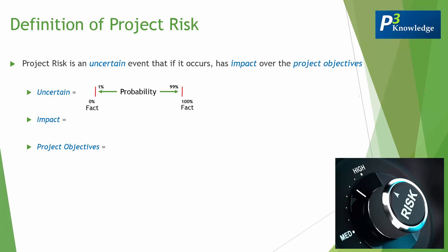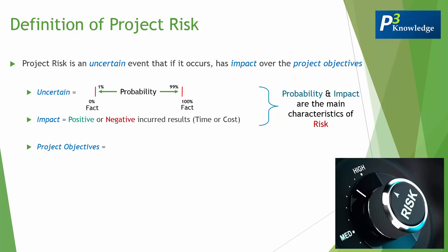The second word is 'impact,' and here we're talking about positive or negative incurred results. Normally those results are measured either by time or cost. As we can see from those two words — probability and impact — those are considered the two main characteristics of risks. Bear in mind, there are many other characteristics such as proximity, frequency, detectability, etc., but here we're going to focus on probability and impact.